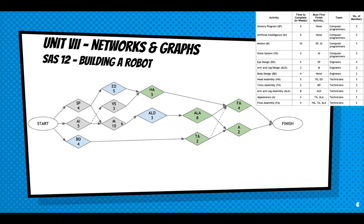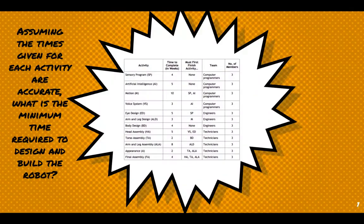So right there, you know, you could affect the total time. You see how that works. If you just moved one, you would affect the total time. But then you'd have a computer to computer programmers, you can lay off and let them go. But a good project manager would realize the duplication of putting extra people in there to help get the process done. That reduced the program by two weeks. That's you don't have to pay them as long if they're not there as long. So it's all about being efficient, that efficient person that runs that program, project manager, he's the one's going to make extra money if he gets a project done early, and he doesn't have to pay people as much.